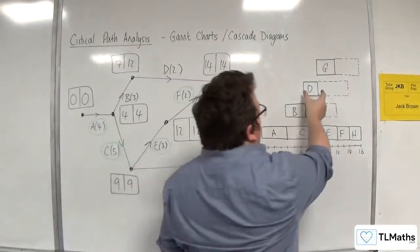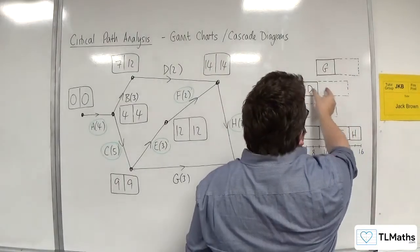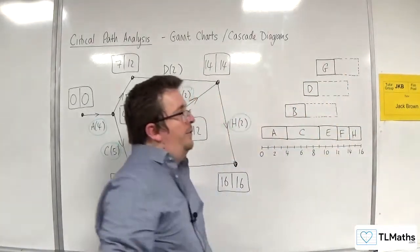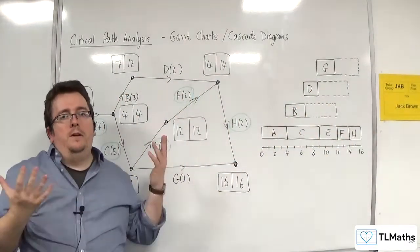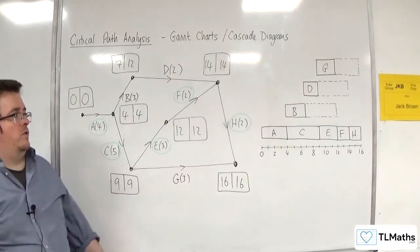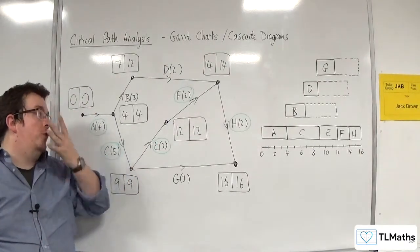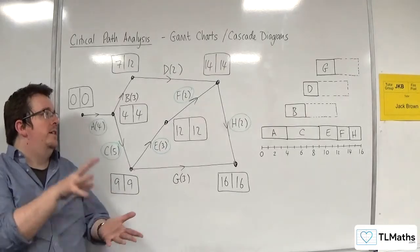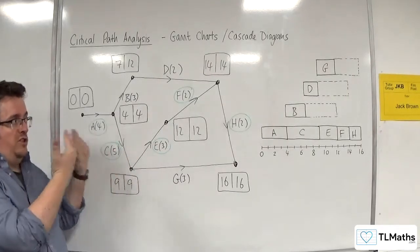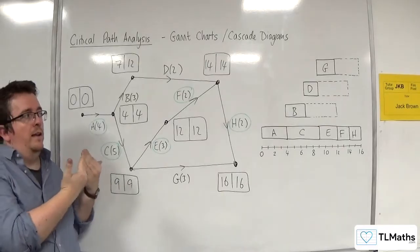The convention is that you draw them at their very earliest start time. So you don't draw D over here, but you push them all to the left-hand side. That's the convention. You could draw it in a different way, but quite often the question will identify that they should start from their earliest event time.